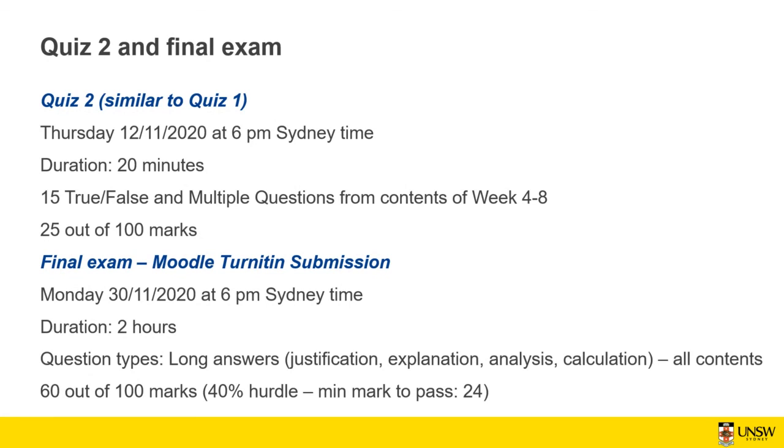Okay, so I hope that I answered all of your questions. Will there be an ETC for task one and an ETC for task two? No. You're looking at the project as a whole, not just at the task. For the task, you can calculate the earned value and planned value, but when you're looking at the ETC, you're just looking at the whole project, not just the tasks. So ETC is for the entire project, the estimate to complete the project.